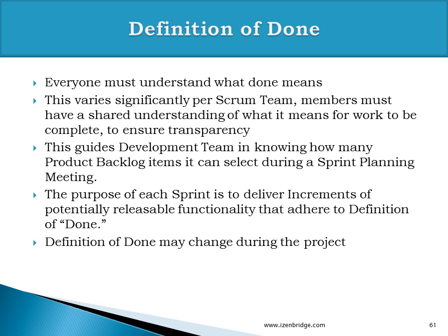And it is also not necessary to keep the definition of done stable throughout the project life cycle. During the project retrospective or the sprint retrospective, you may identify a few things you should include in your definition of done, which can make your process better and your sprint more enjoyable. So if you have that kind of action item out of a retrospective, your definition of done may get changed during the project or during the release.